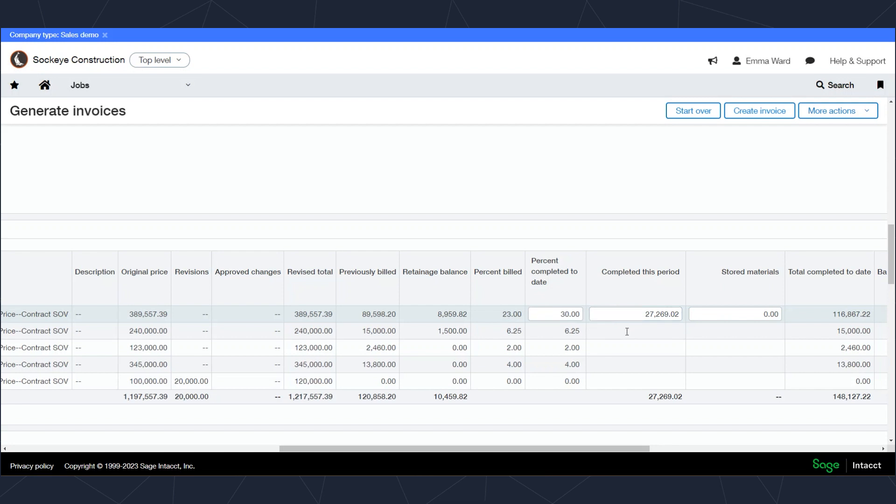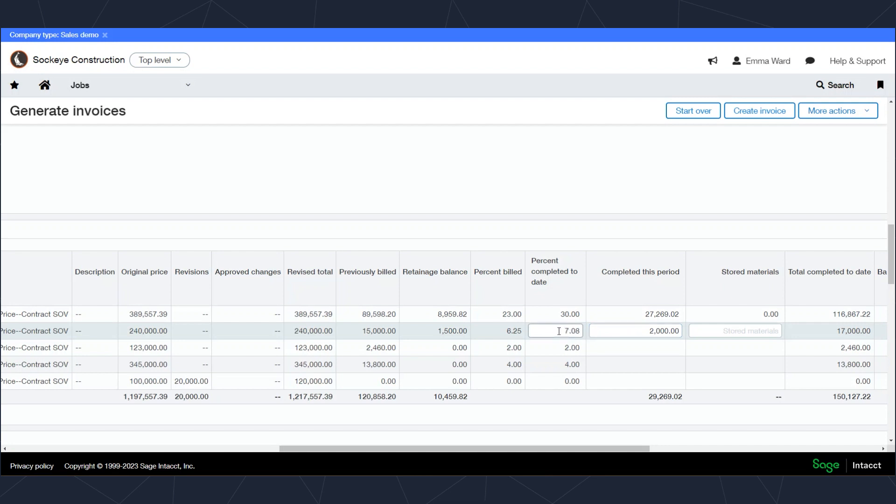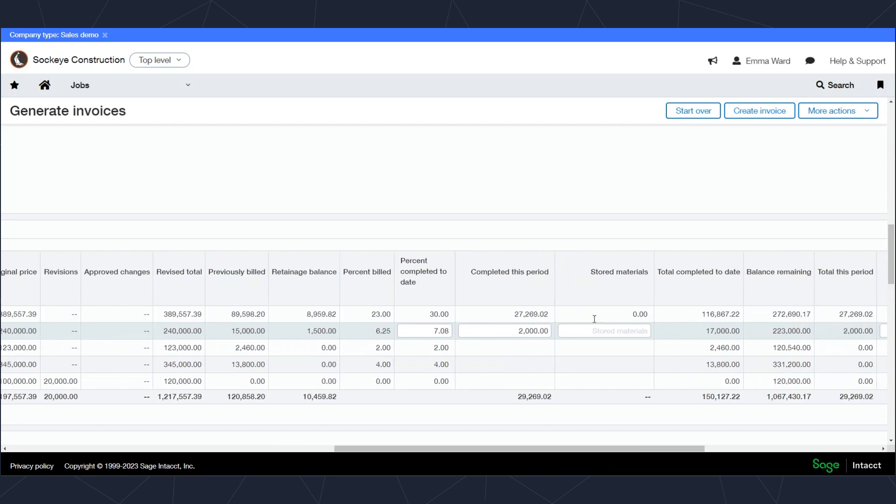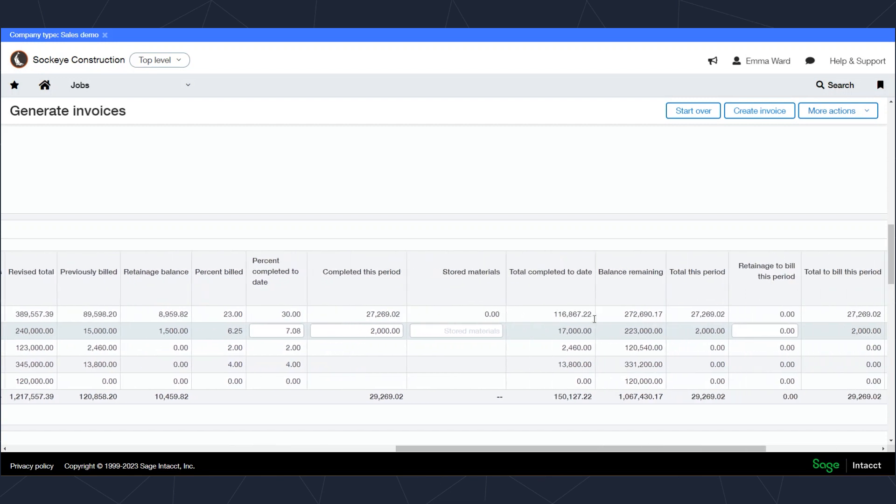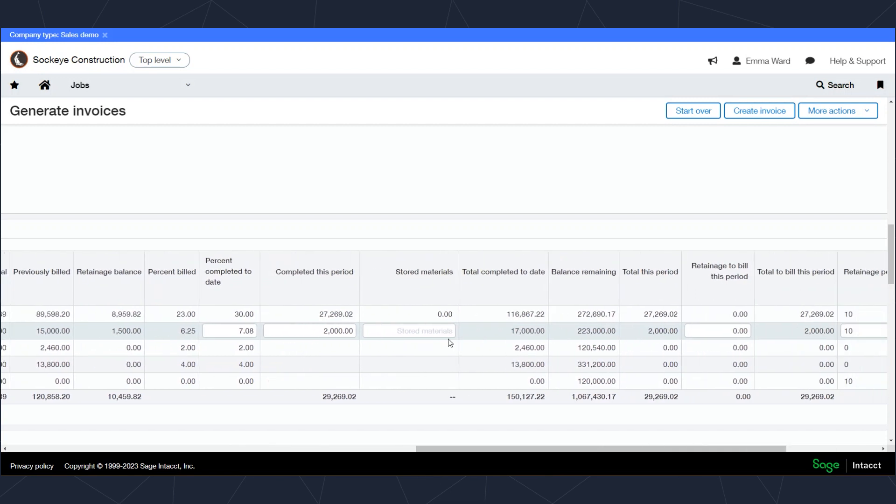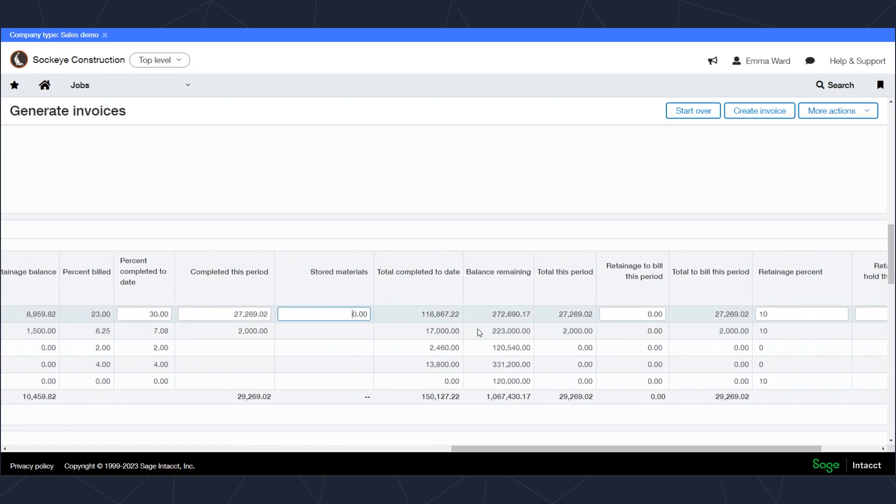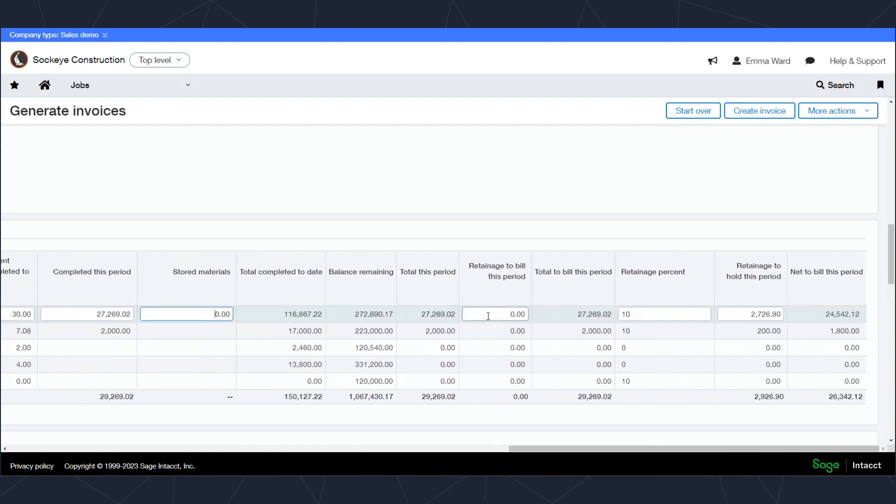If I want to bill $2,000 on this line, the system will then calculate what total percentage that brings us to. Now continuing to the right on my schedule values, I can see a place to enter stored materials. I can also enter any retainage that I want to release on this invoice process, as well as the retainage to withhold from this line on the invoice.